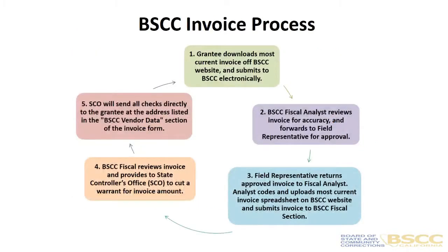This is a high-level summary of the invoice process we wanted to introduce to you. You download the most current invoice off the website and submit it to us electronically via either the submit button or your email. One of Deanna or I will review it for accuracy and then forward it to Ricardo for approval.